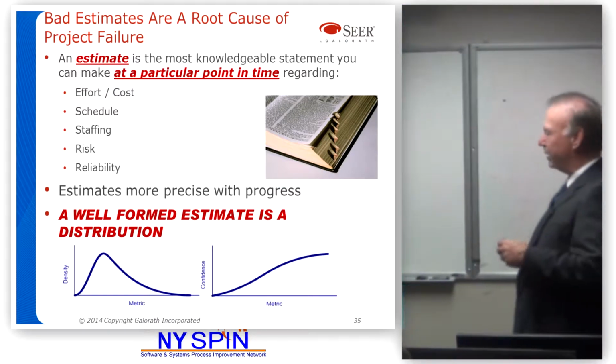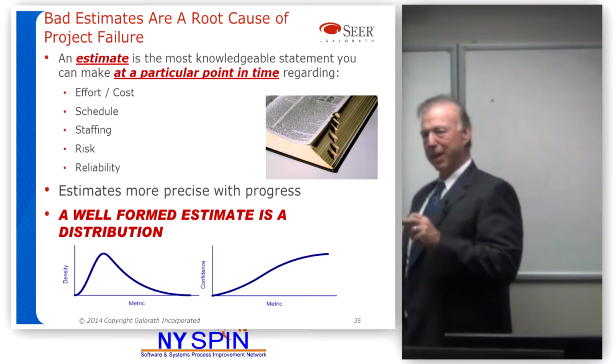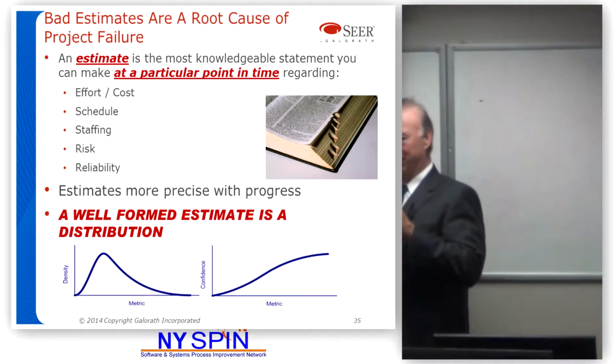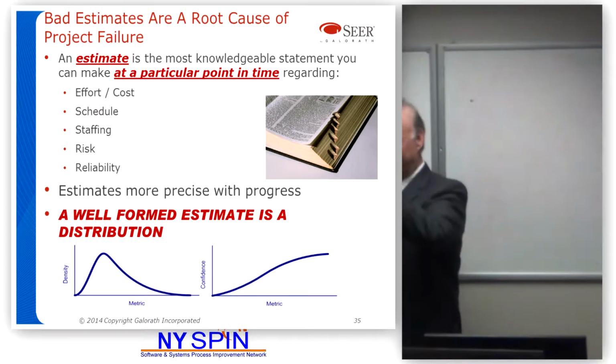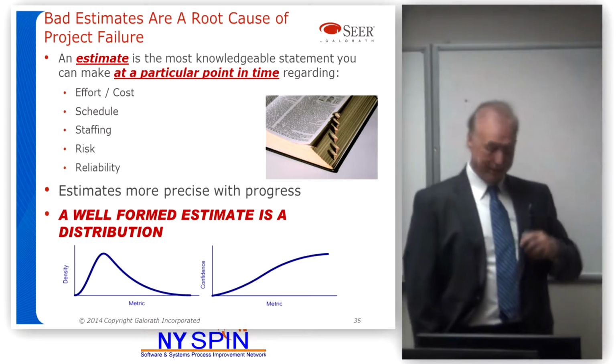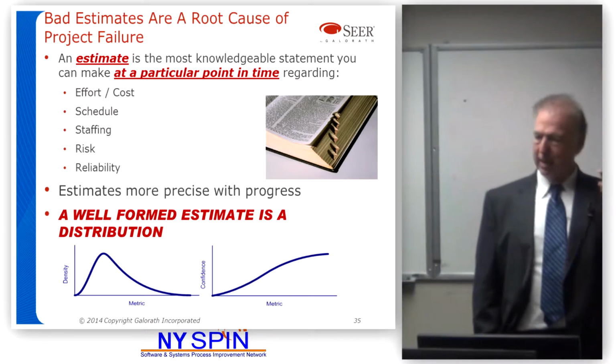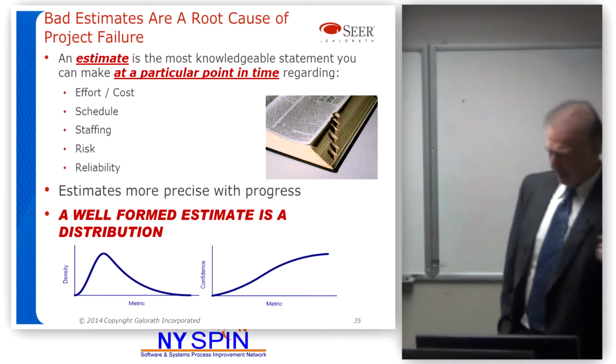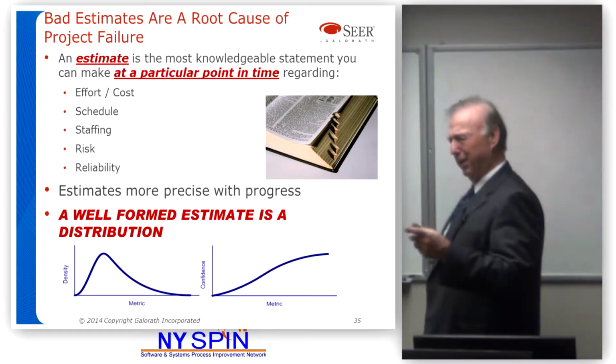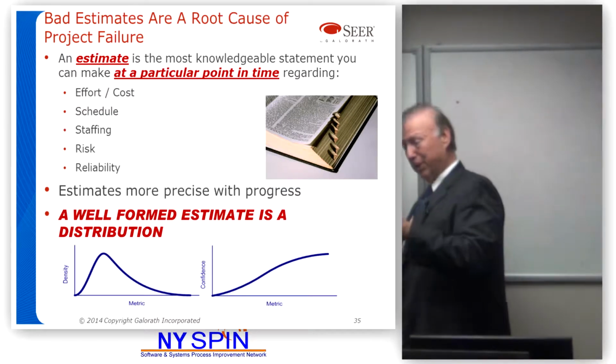And if they say 2 weeks, ask them next, what's the best case to get X done? You want to know what it'll be? 2 weeks. People generally, developers especially, estimate the best case. And you say, okay, what's the likely case? Likely case means some things go wrong, and you get another number. And then what's the worst case?